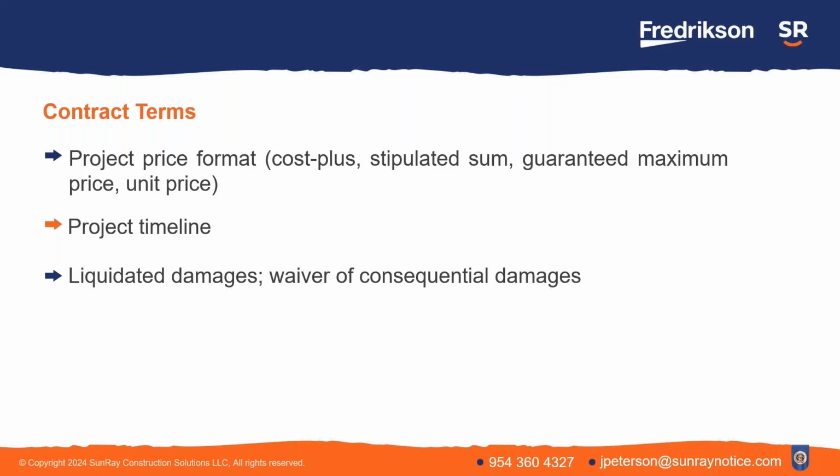These are somewhat more rare because they're a specialized contract that would be used in a particular circumstance. You wouldn't see this in a residential home building contract or even a lot of commercial construction contracts for that matter. A unit price contract is used where the construction is going to involve lots of units or instances of the same kind of work.